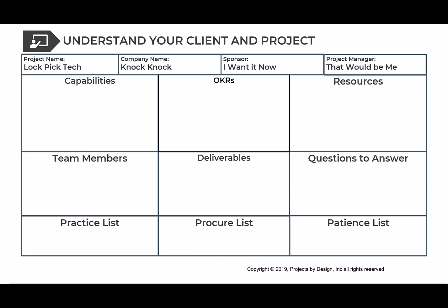I understand the SharePoint list thing, but I also have some spreadsheet tools, Excel-based tools that I've used at the portfolio level, that help me understand where the demand is coming from, and then at the aggregate level show what value we've received for the effort put in, if not at the granular level. Because in order to get it at the granular level, you have to get them to enter time card information on 10, 20, 30 work items a week. It falls apart pretty quick.